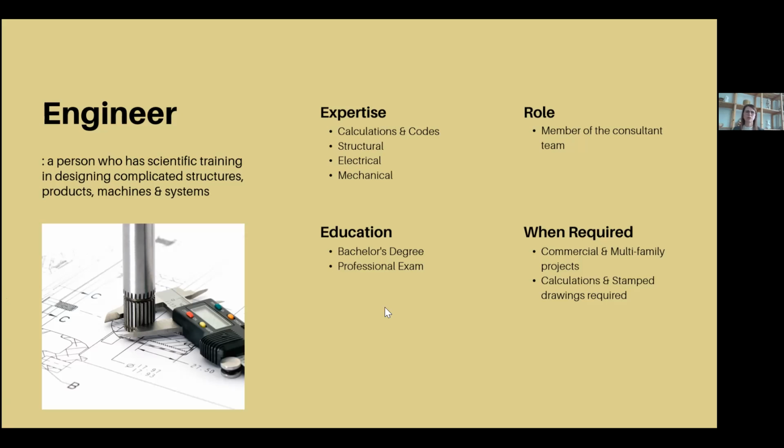Engineers have a bachelor's degree and a professional exam, and they are generally members of the consultant team. Generally, what happens is an architect or an interior designer will bring the engineers onto the project, depending on which ones they need. They are required when you have a commercial or multifamily project. Again, if there's anything that requires calculations and stamped drawings to do with structural, electrical, or mechanical, they are required.